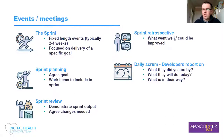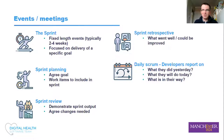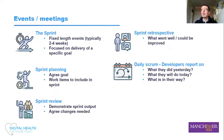Then there's the retrospective, which is different from the review — it's more focused on the Scrum process and the way the work was carried out. It's about learning from what went well and what could be improved, enabling continuous improvement as a team. On a daily basis, there is the daily Scrum, where developers answer three questions: what they did yesterday, what they will do today, and anything that's in their way. It's a short meeting — probably 10 to 15 minutes — giving everyone a chance to find out what's going on and support each other.